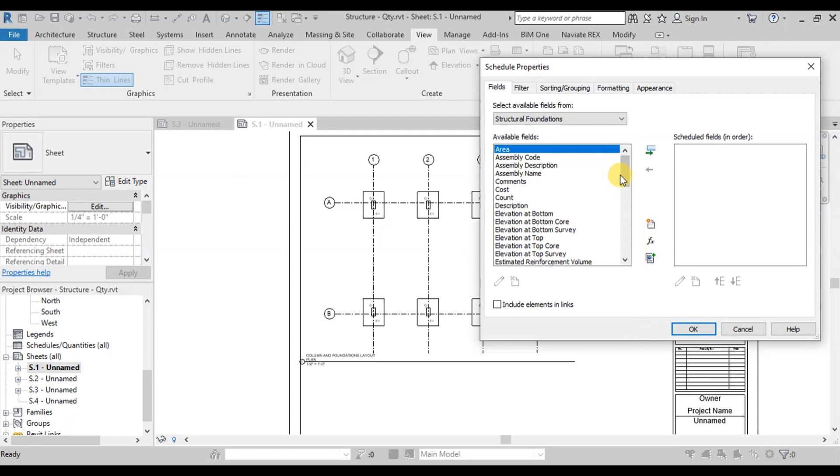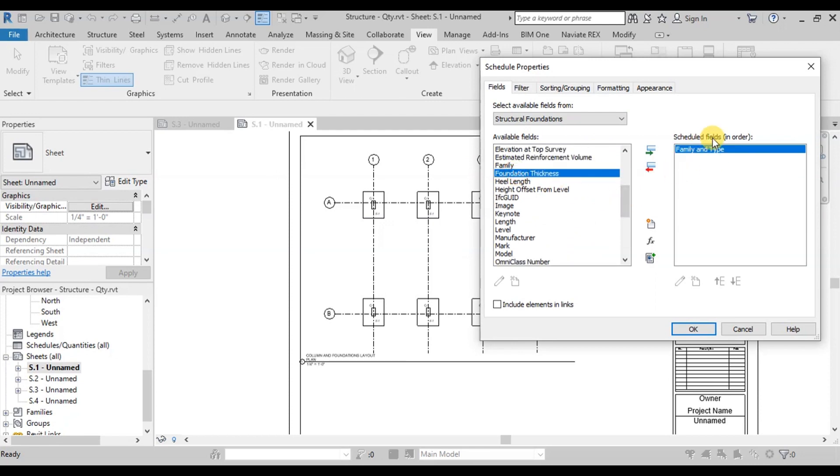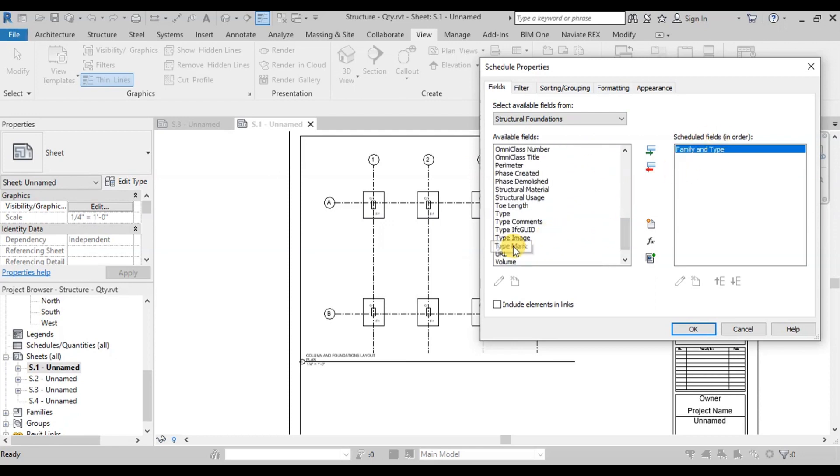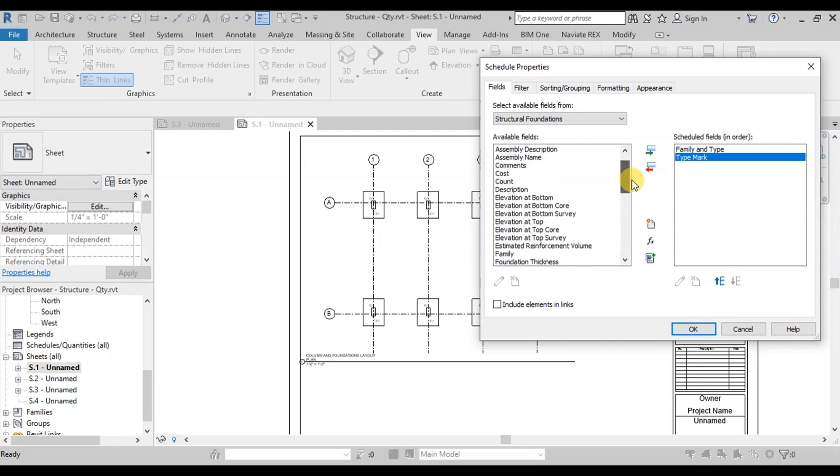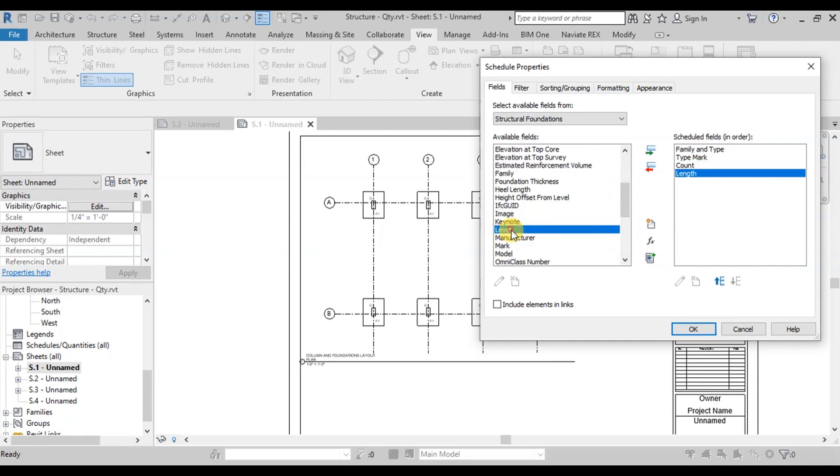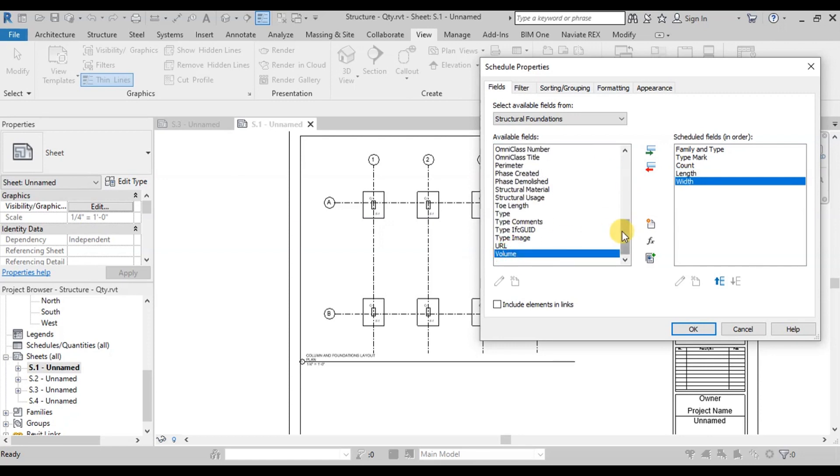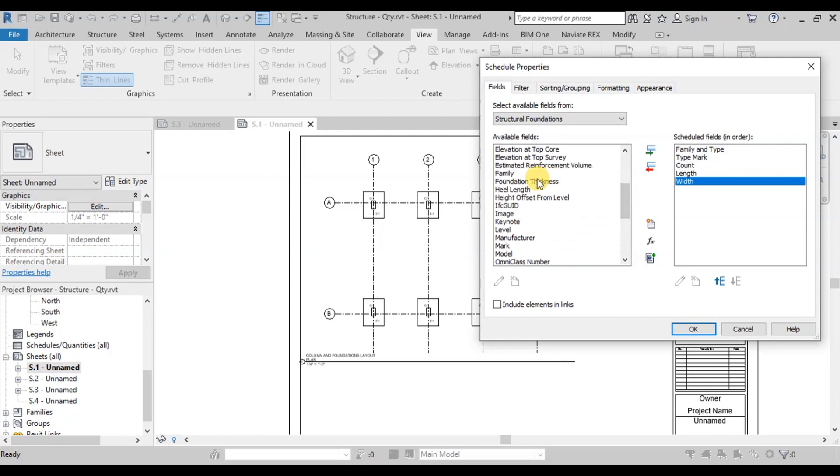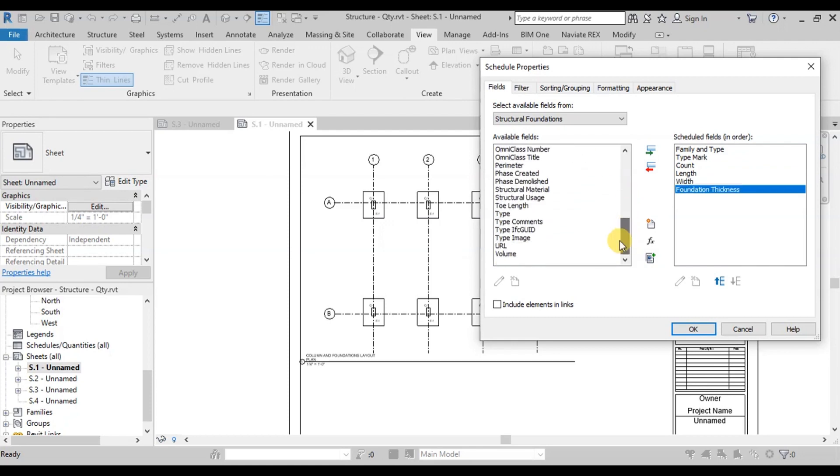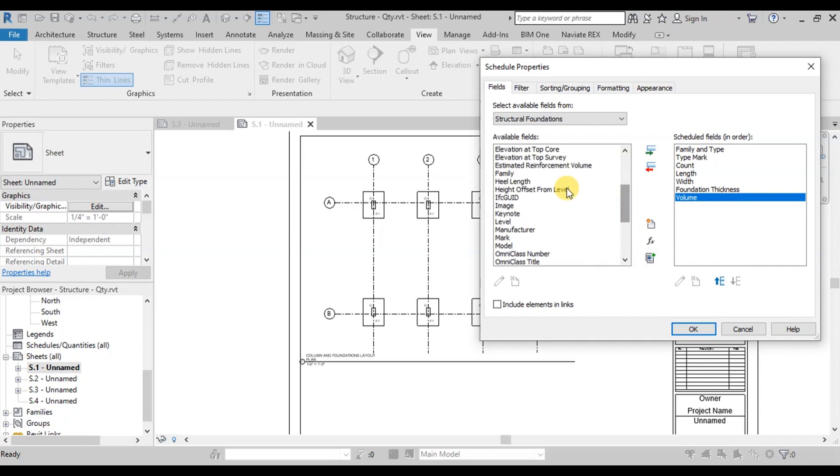Here we have a lot of fields related to structural foundations. First of all, select Family and Type. Now select Type Mark. Now we will select Count Field. Next is Length of Foundation, then Width of Foundation, finally Thickness of Foundation. After Dimensional Properties, we will select Volume of Concrete and Estimated Reinforcement Volume.